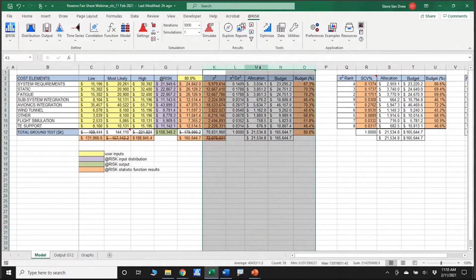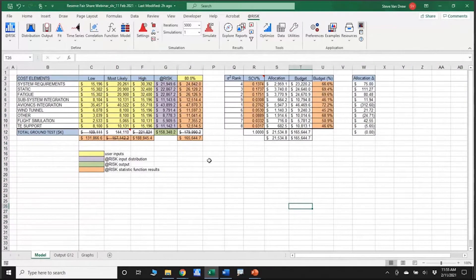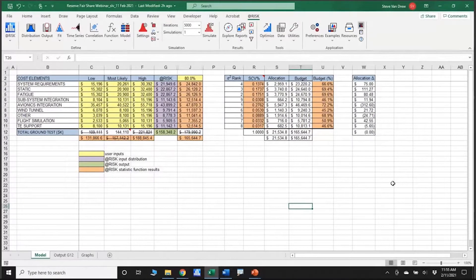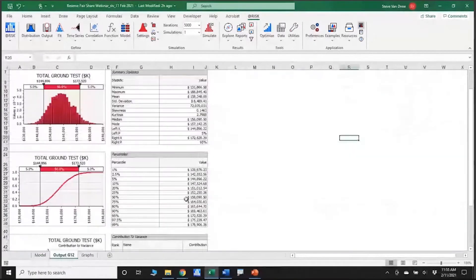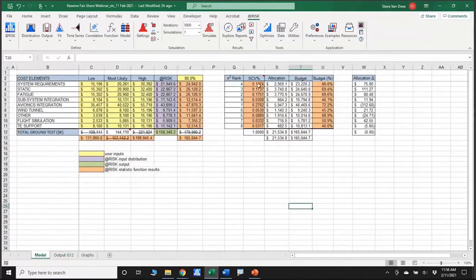We've still got the same basic information and still want to do everything at the 80th percentile. Instead of going through the somewhat monotonous calculation of individual variances divided by their total and doing the allocating, why don't I just tap into what at-risk has already given me? Contribution to variance is one of the sensitivity analysis tornado graphs, and over here you can see the values — the ranking one through nine. There is a stat function called risk sensitivity.